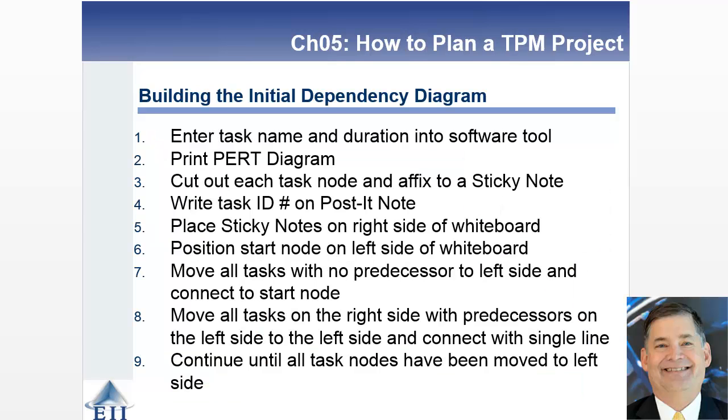So as you're building your initial dependency diagram, you're going to go through and start by creating all of the task sticky notes, if you will, either in the software tool or just on a whiteboard. And then you start moving and adding those tasks and continue until everything has been moved into the diagram.